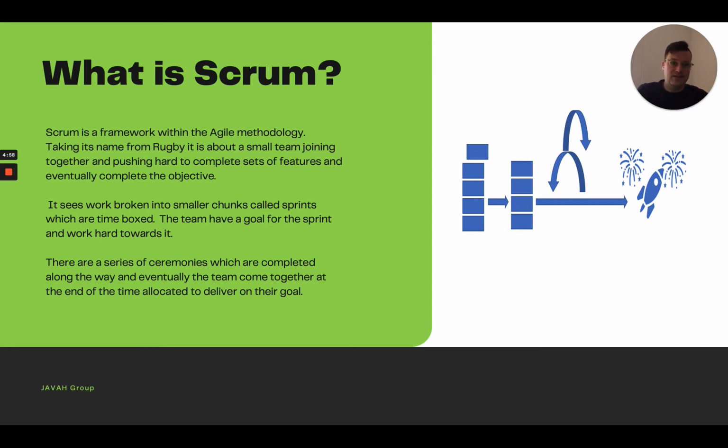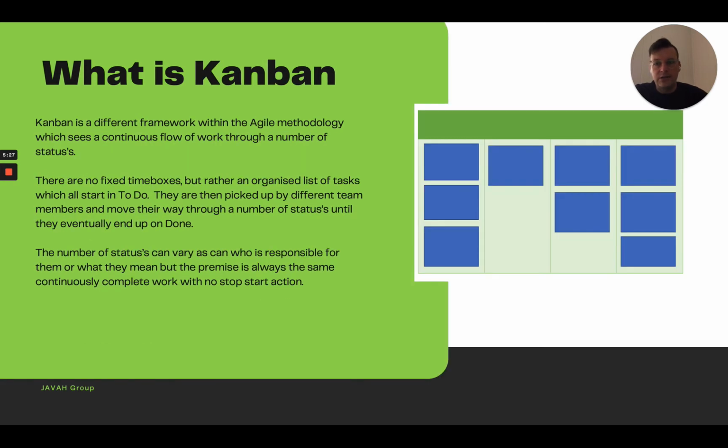It also really helps having hard markers in the sand to be able to say, okay, at the end of this 2-week time box, we will be done with this set of features and we will be able to deploy them and our customers will be able to interact with them. So it gives you some really good hard markers so that the team has a goal to push towards and deliver upon, but also everybody else externally is able to see those value drops and interact with them. So it can work quite well.